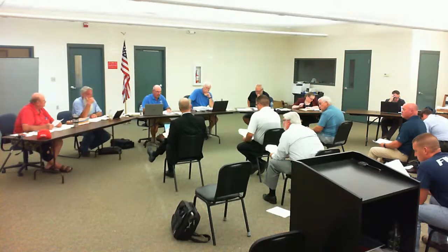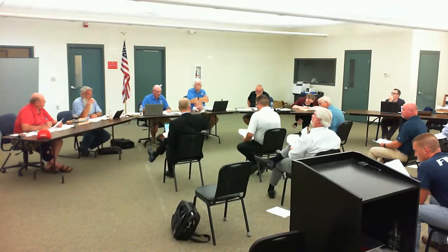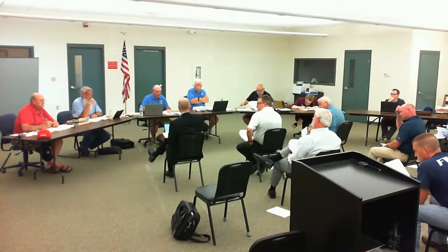So there may be a section of main replacement or some lead service lines that you've identified for this year or these projects this year. You will bring in enough cash to actually pay for those projects on an annual basis, whereas with the bond-funded project, you get all the money up front. When you spend it, it's gone, and you're going to pay for it for a couple of decades.